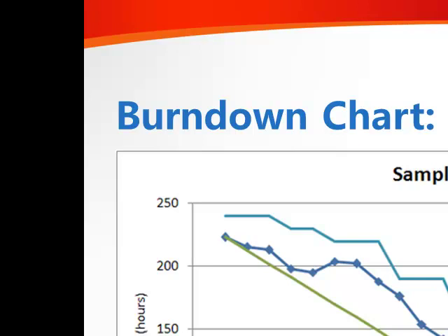At day 0, when the sprint is going to begin, this should be the maximum number of tasks assigned to the sprint, and the completed tasks, denoted by the orange bars, should of course be 0. None of them should be completed. The remaining effort should be ideally at the highest level it's going to be, again, upper left, and the remaining tasks, since they are all still open, again, will begin in the upper left.